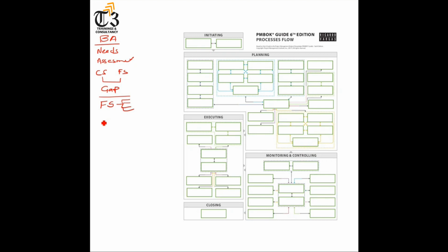Once one of those options is selected, our business analyst makes the business case, which contains the reason why we are doing the project. And based upon assumptions, we prepare a document called the benefits management plan, which contains financials, the name of the benefit owner, the strategic alignment, the net present value, internal rate of return, payback period, return on investment, all these things.